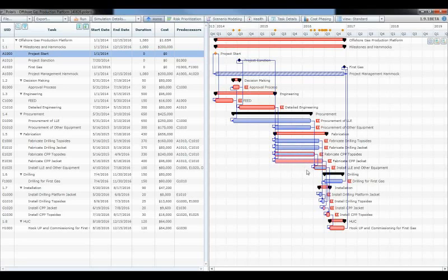Well, you can see here that you've got a deviation in your critical path. This item just became, or has a higher likelihood of being, on the critical path. So this may be a new thing that you may need to start managing as a project manager because of the risk and uncertainty that we've loaded into this particular model.